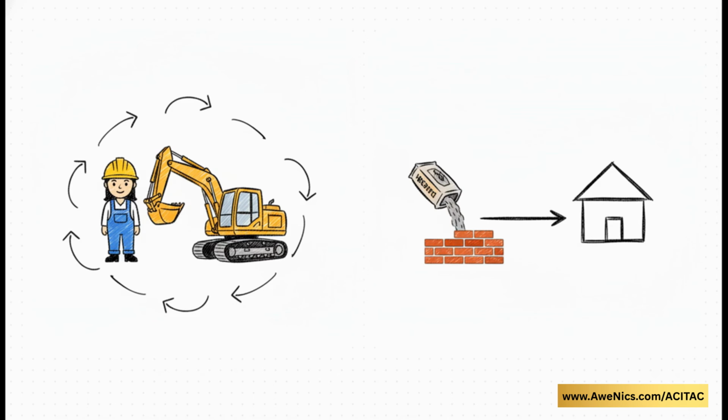Material resources, on the other hand, are consumed in the final product. We're talking cement, aggregate, paint. Think about it. Once you use a bag of cement on a foundation, you can't exactly scrape it up and reuse it on the roof, right? And because it's consumed, it always requires a unit of measurement, like a bag, a liter, or a ton.